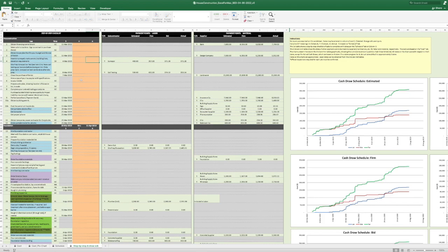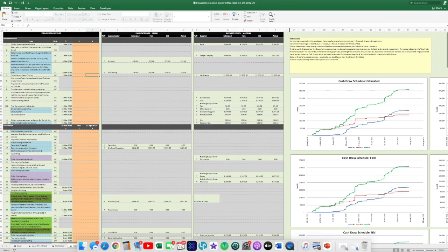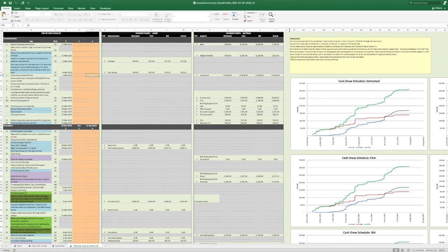Oh, okay, here's the actual date that we completed this. The schedule says March 7th, but we actually did it March 10th. Those kind of things. But you can go back to the schedule and input March 10th, the actual date, in the schedule tab for it to update the future dates, so that you can have a better idea of when the tasks depending on that task are actually going to be completed. If you're 3 days late on this, it can push these dates appropriately so you'll have a better idea of when these things are going to happen.